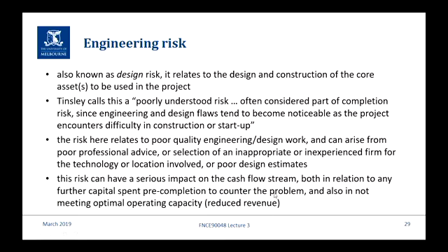So it's another risk that can have a serious impact on cash flow. First, in relation to cost overruns, because you might have to spend money to fix it before you get to completion. But even if you get to completion and it's just not working to capacity, you'll never make your revenues.